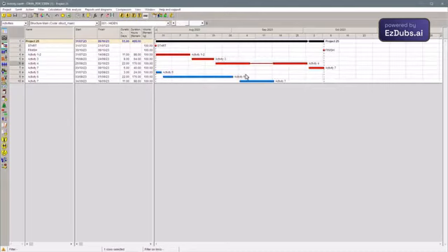This is the CPM version increased by 5 days, because I programmed it to interrupt my activity. The strangulation of the colored bar makes this interruption very clear. If I didn't have the interrupt, it would revert back to the previous unrealistic date pattern for 2 reasons. Because I am not including my scheduled interrupt, nor am I considering the rare resources. Now I'm going to make the algorithm, in addition to considering my scheduled stop, consider this condition of rare resources.